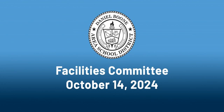Okay, just because the cheapest quote doesn't have anything written on it, other than we're going to replace the hot water heater for $13,000. So, do you have a preference of vendor on this? Just because that's a very vague quote. My preference would be one of the 2 $13,000 vendors. Okay. Push that to a vote. I would just like to see a scope of work on the $13,000. All right, I'll contact them tonight.